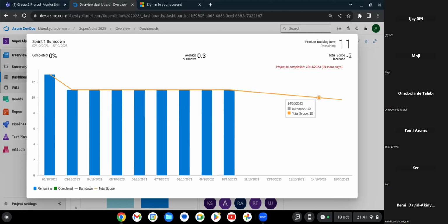But does that not mean that it's not taking into account, like you said, the work that is being done, that the developers may be working, the QAs are working? It won't. It only takes into consideration what is closed, because until it gets to closed, it's not completed. You've not met the definition of done until it gets to closed.